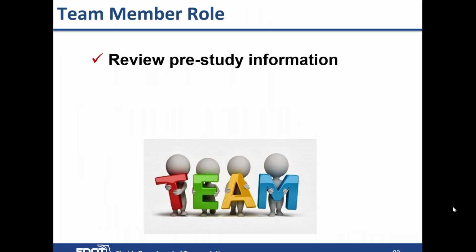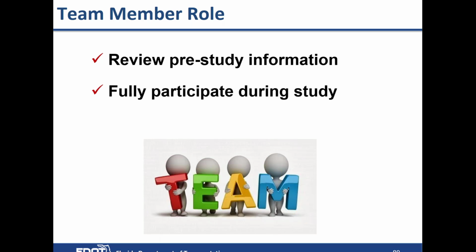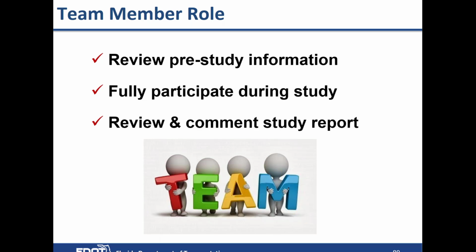So if you're a team member on a study, here are the things that you should be aware of and what's expected of you during that week, and not only during the week: review the pre-study information, and fully participate, which means 100% time during that week. You're away from your job for that week. Fully participate during the study. And then after the study, you need to review and comment on the draft report, which will be sent out by the facilitator, just so that what's recorded and how it was recorded is an accurate record of what was done during the study.